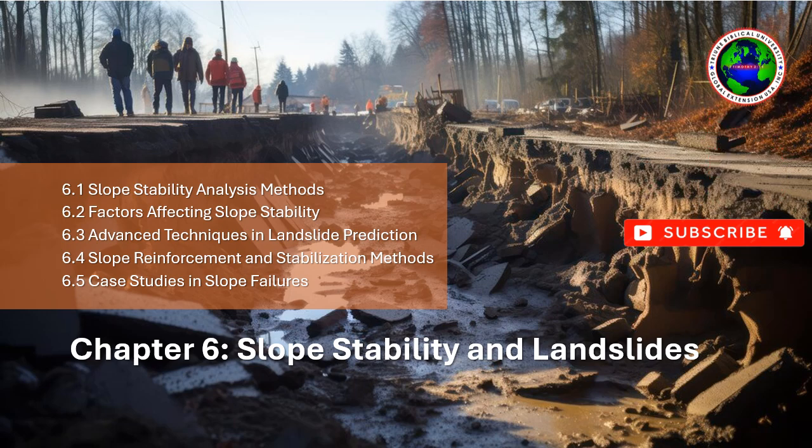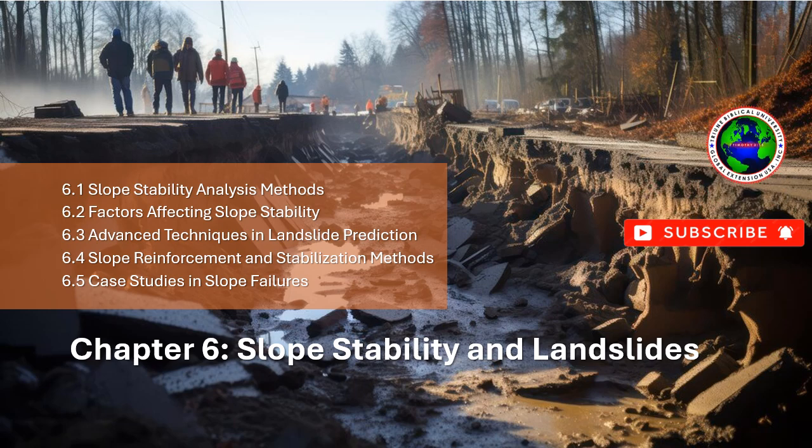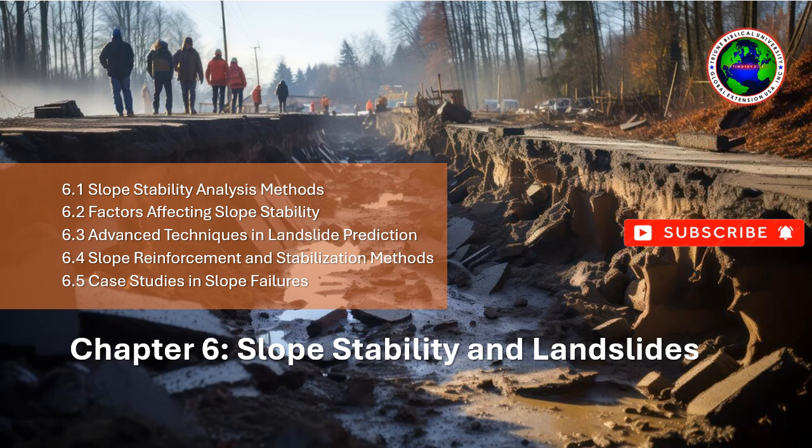The region's geological conditions, including the presence of natural faults and a weak subsurface layer, contributed to the instability of the area and the rapid spread of the mudflow. Lack of proper safety protocols. The drilling operation lacked sufficient safety protocols and risk assessments related to the possibility of a mudflow.